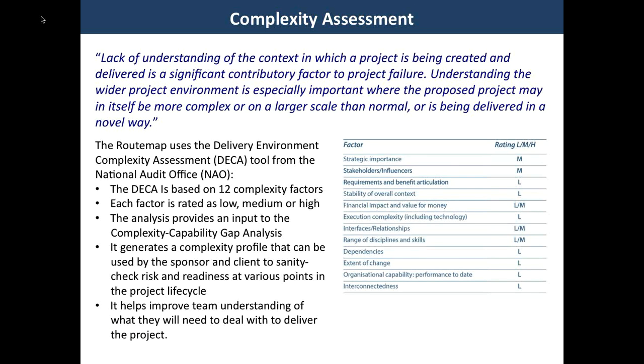A lack of understanding of the context in which a project is being created and delivered is a significant contributory factor to project failure. Understanding the wider project environment is especially important where the proposed project may in itself be more complex or on a larger scale than normal, or is being delivered in a novel way. The route map uses the Delivery Environment Complexity Assessment, or DECA as we refer to it. This is a tool developed by the National Audit Office.